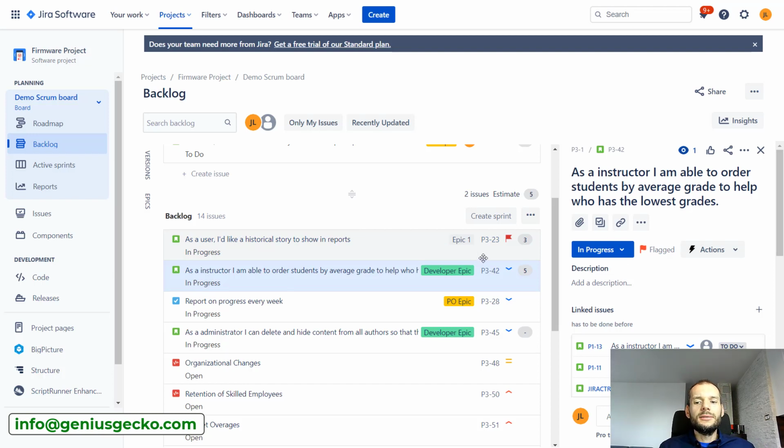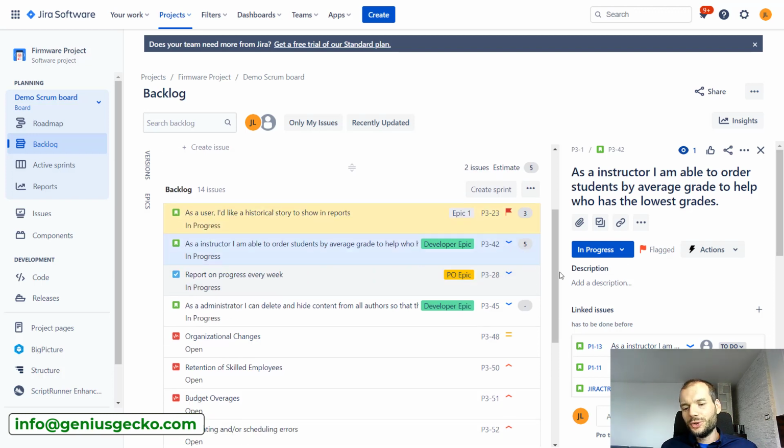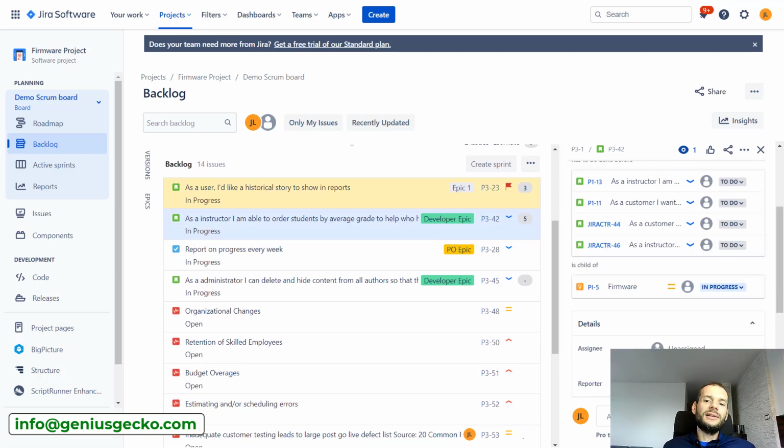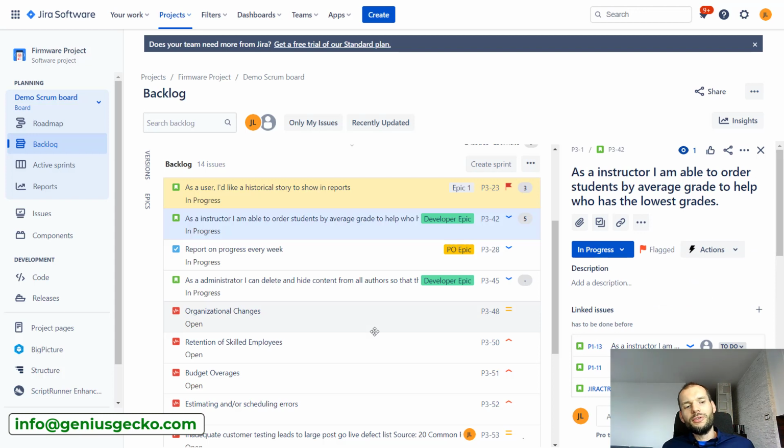Still, sadly, that is quite an overhead. So someone, usually the product owner, has to go through this issue, verify all the dependent tasks, whether they will be delivered before we start the sprint or not. And yeah, sometimes it changes. So something that was planned for a sprint in the other team falls out of the sprint.